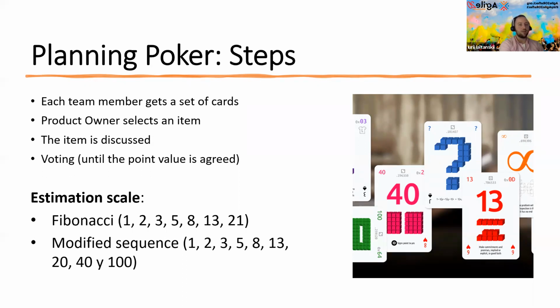For example, I'm a senior developer and I say, to develop a complete solution with front end plus back end database side, an item like that is to me 3 points. I'm experienced, I have hands-on experience with that, and to me it's up to 3 days of work at maximum, and I'm done.